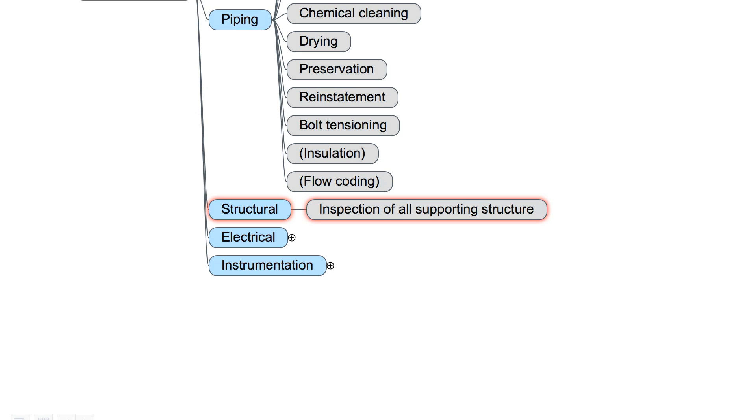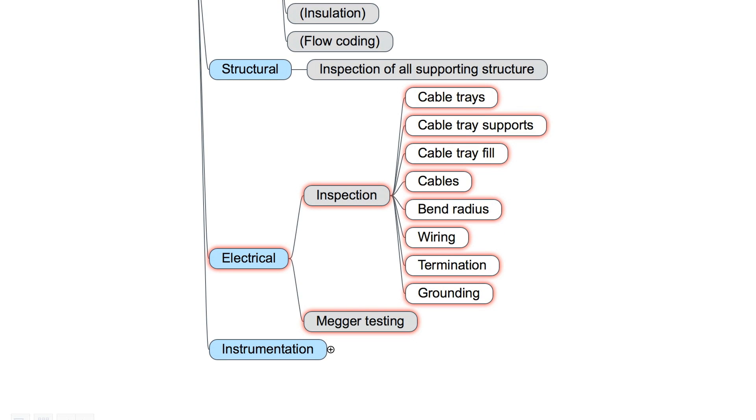The inspection of all supporting structure is the typical task for the structural discipline. Electrical. We have to inspect cable trays, cable tray supports, the cable tray fill, the cables itself, the bend radius of the cables, the wiring, the termination and the grounding and, for sure, mega testing.